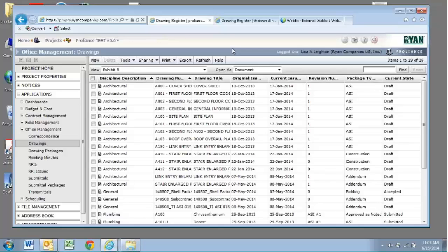After you have your bidding drawings, you could have what's called addendums. Addendums are changes to the drawings during a bidding process. Then you may receive your construction drawings. From there, you can have different changes. A lot of times your changes are going to be named based on how that architect actually handles it. There's not one way to do it, so you're going to see them called many different things.